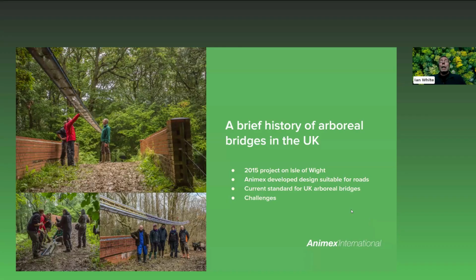We had dormice on it very quickly, but moving this onto a commercial design is challenging, not in terms of the design, but in terms of proving concept and certainly proving use of it. Because, as I no doubt Steve will talk about later, when an arboreal bridge goes into an area, the reason it goes in is because dormouse are considered to be in the vicinity. So usually before a bridge goes in, that habitat will be cleared, so the dormouse population will be pushed away. The bridge then gets put in. The habitat needs to be restructured and restored. That could take for dormice anything between 5 and 8 years.